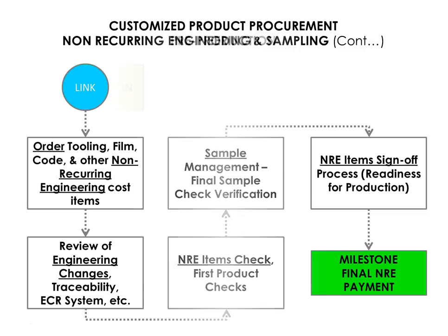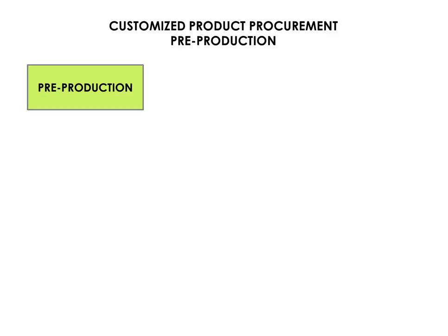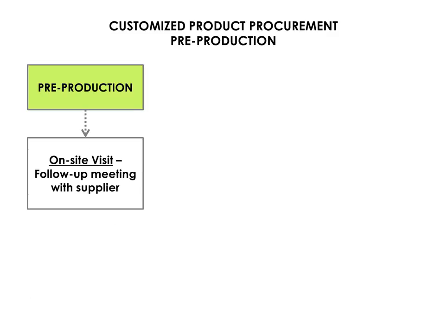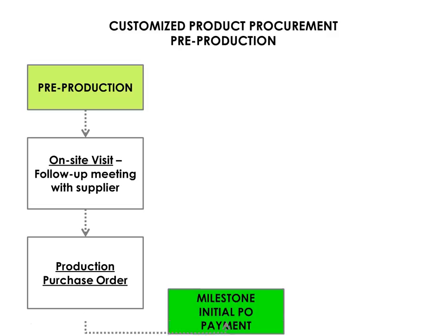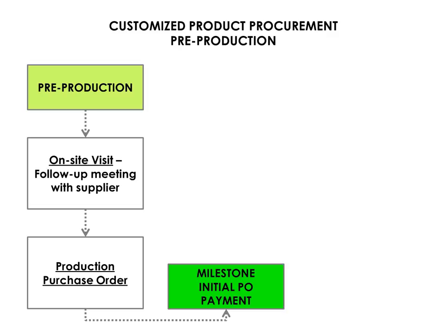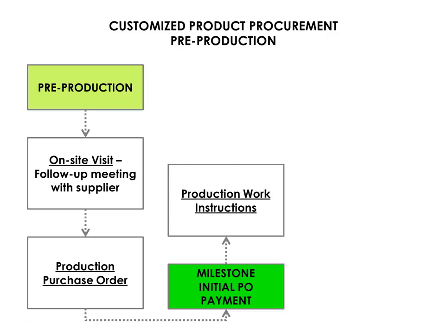Moving on to phase three, the pre-production phase. It is important to have a follow-up meeting with your supplier at this stage for your new product introduction plan. You need to go through the agreement and cover all the critical elements and deliverables as well as setting expectations for production. The next step is to place the order for the initial production quantity, which also means you need to be paying the initial amount against the purchase order. A key aspect of getting product manufactured correctly in mass production is repeatability, and part of that is to have a good set of work instructions.